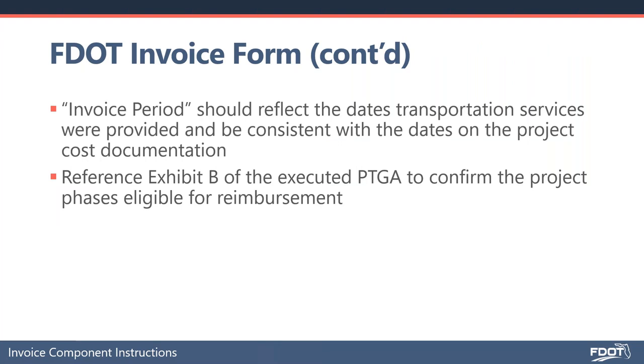So really important on the invoice form is that the invoice period that we're referring to is the period in which you provided service. It is not the period in which the expenses were incurred. Because remember, if we're not submitting backup documentation to our financial services, they're not interested in knowing when the expenses were incurred. They're only interested in understanding the period of service that was provided for where this cost is coming from.